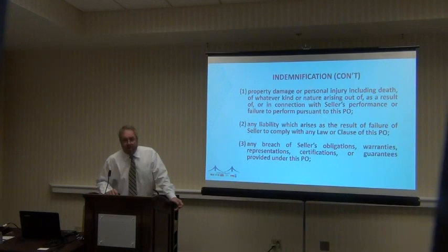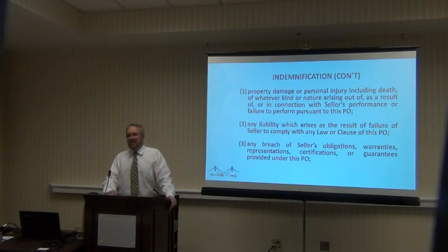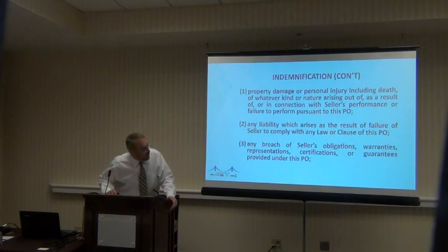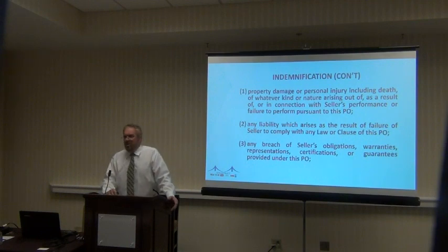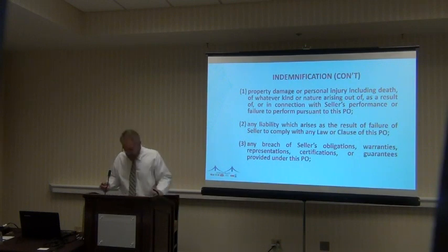Here's my argument that I always use on 3. I have a contractual obligation to do that stuff anyway. Why do you want indemnity? Isn't that adding surplusage to what I've already given you? I'm already obligated contractually to my obligations, to my warranties, to my representations, to my certifications or guarantees. What does giving indemnity add to that? Get rid of that. That argument works more often than not. If it doesn't work, try to boil it back to a concept of negligent conduct rather than breach of contract. Comments on that?